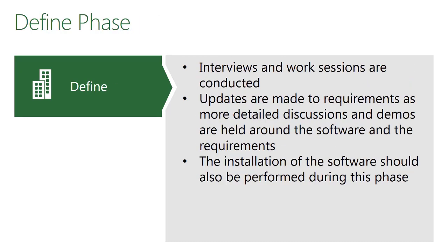which takes us into define. So defining will allow you to take those rough requirements and then build it out into your hard requirements by interviewing certain personnel, different managers, project managers, and departmental heads. This will allow you to define the actual configuration settings that will go into the tool, like custom fields and views and reports. At this time, if it's on-prem, software should be installed. If it's project online, licenses should be purchased and set up.